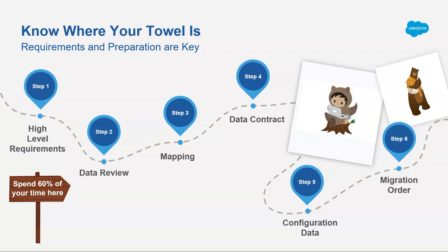Additionally, everyone sees this a lot, there's gonna be a text field, and it's gonna have a phone number or it's gonna have an email in it. And when you're running your data migration, that's gonna end up being an exception. So it's really good to deal with those exceptions up front. So you have three options to deal with the exceptions. You can either have the client clean up the data before you do the migration. You can address the exception and make a note for the developer to ignore that value when they're doing the migration if it doesn't meet the field type.